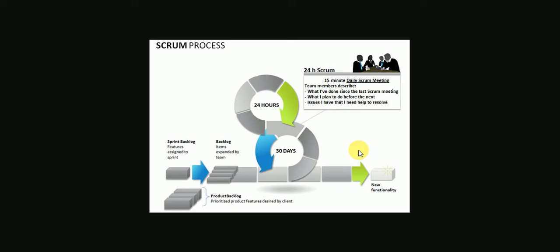process. Traditionally, the waterfall model works like this: the business analysts will take up the requirements from the customers. They will document everything in terms of software requirement specifications or functional specifications. They hand it over to the designing team, who will come up with certain designs or mock-ups. They will further hand it over to the developers, who will look into those designs for the UI, look into the architectural documents given by the architect to decide the system architecture, and then they will start to develop their system.